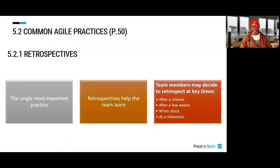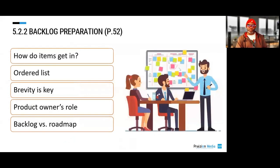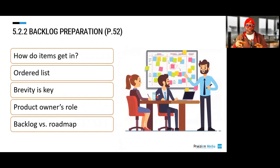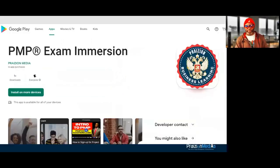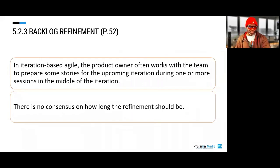The rest of this chapter talks about events in Agile. Retrospectives are the single most important practice as documented by PMI on page 50. We also talk about backlog preparation — how do items get into the backlog? There's got to be some interface between stakeholders and the product owner, and it ultimately gets put into a backlog, and a roadmap will be crafted. Then we talk about backlog refinement: we need to refine our backlog, which is a list of all the things the customer wants.